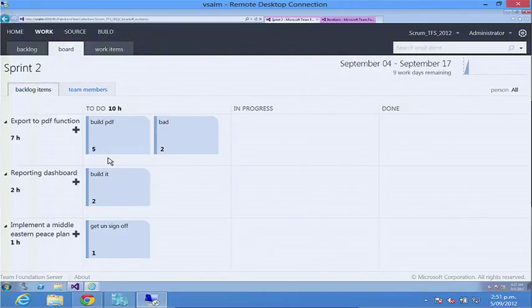So let's go back to backlog items, and we want to start moving. So we move stuff across to in progress, and our burn down updates automatically, and our columns here update automatically. When I want to update work remaining, I can just one click from here and update it, so I don't even have to open it, which is nice. Drag across to done because I'm finished. And oops, didn't include testing, better put it back. Now you're going to give me the error because, and there's a book in it for you. What's that?